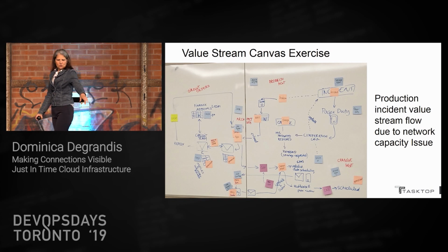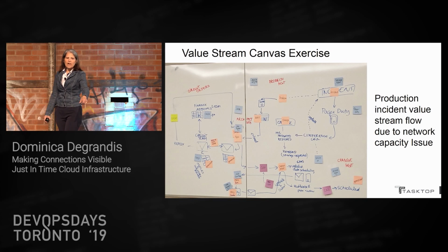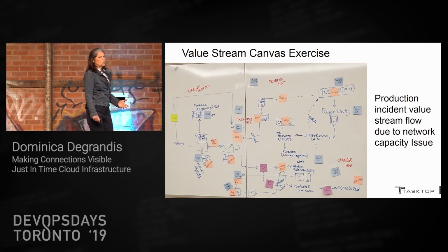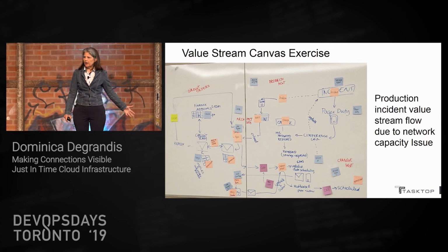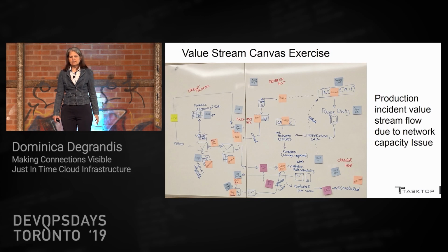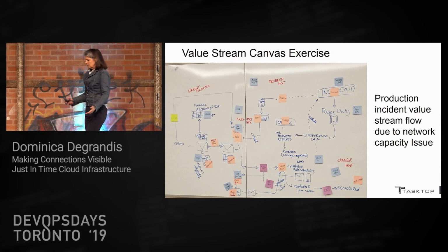And then the change order gets submitted, it has to be validated. Then there's this authorization and peer review. And then it has to go to CAB. It has to get approval from the change approval board. And it sits there and waits on CAB. Eventually it gets scheduled. So something that could really probably take a couple of hours takes 6 weeks.